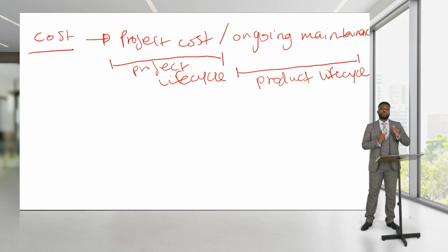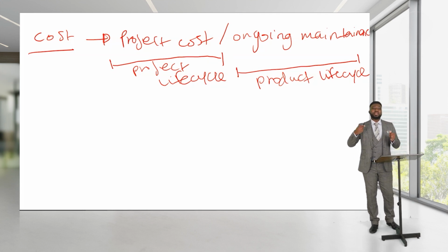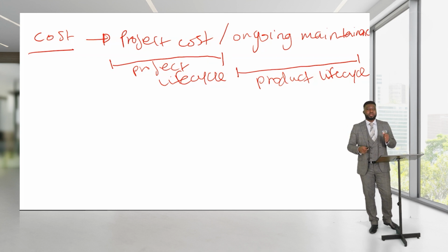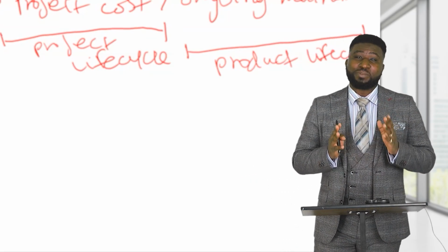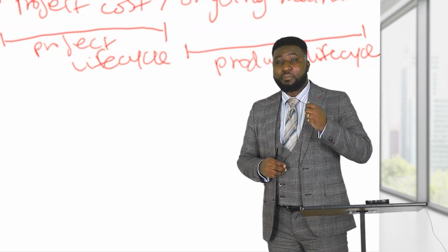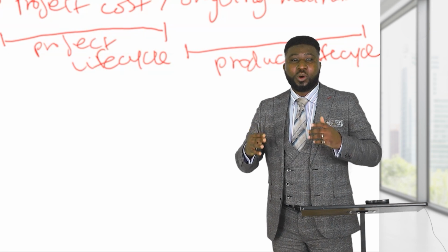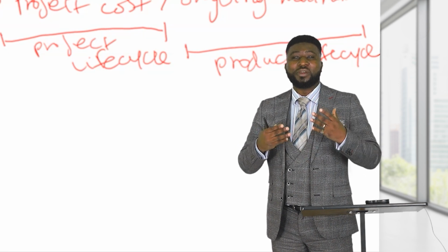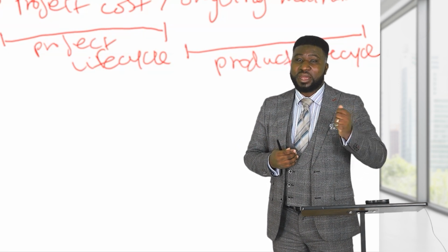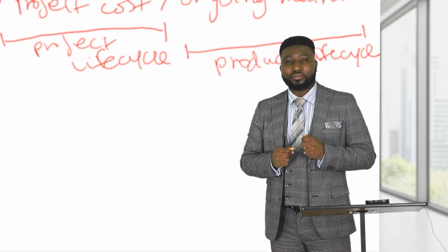Now, we said we go to reasons. And the purpose of reasons is to come up with all the reasons why it's a terrible idea to do nothing. All the reasons why we can't stay in the current state. Then we move from there to expected benefits. And the expected benefit is focusing on our main option. We want to understand all the good things that we will get as a result of implementing this main option. And we said that this benefit must be measurable.